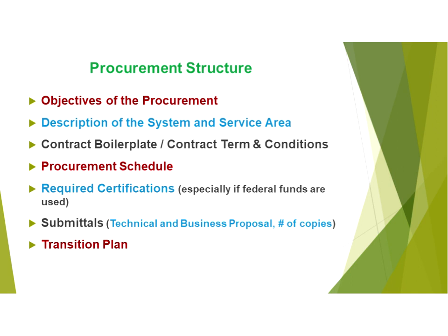The guts of the business proposal is the offeror's completion of the RFP's price sheet. A well-structured price sheet, which can also be provided as an electronic spreadsheet, will enable the agency to project costs over the contract term without reference to the option years. Most states won't let you evaluate price based on option years.